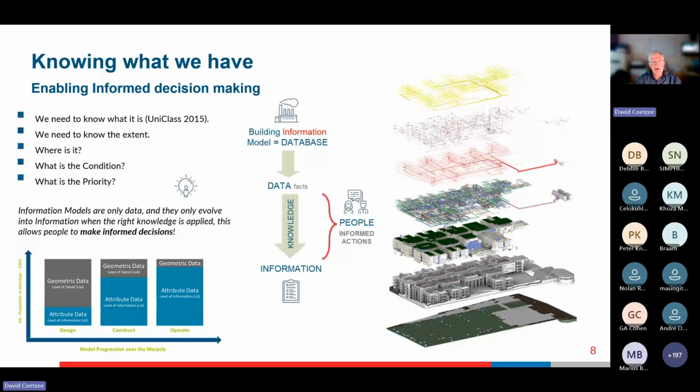If you've worked on one, you'll know how difficult it can be to shoehorn all the little bits and pieces into that. And from a clash detection point of view, we are constantly trying to fit things like fire equipment around electrical and mechanical trays and ducts. But it's fairly obvious that if you have a 3D model, extracting from that the extent of every item within that model becomes pretty much an obvious thing that you can do. So you know the volume, the square meters, the length of every single asset. But before you do that, the first point, we need to identify what all the different asset types are.